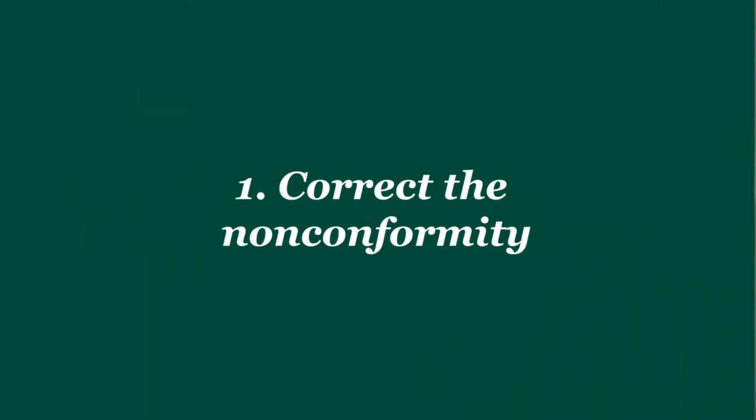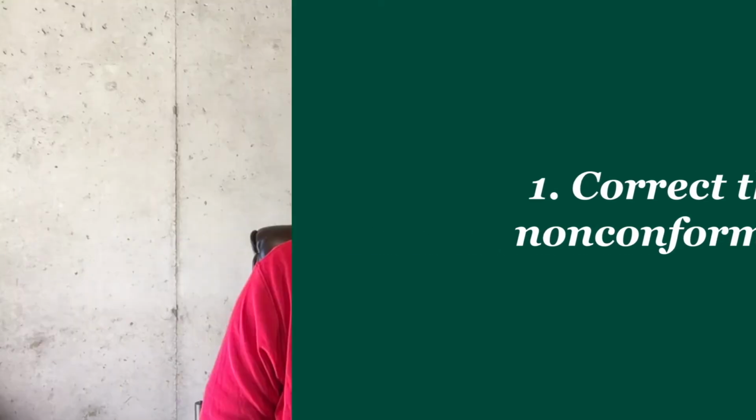If the standards aren't met, an item is found non-conforming, and the project is ineligible for certification. As a woodworker, you then have three options. First, you can correct the nonconformity to meet the standard, and the project will be approved for full certification.